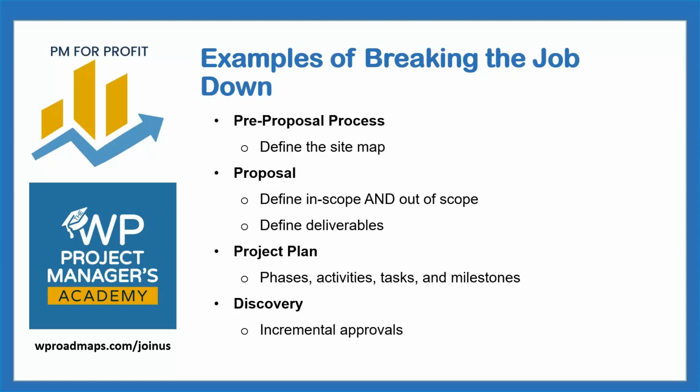It's okay, Mr. Customer, you have approved the sitemap, you've approved the layout, you've approved the content specification, you've approved the functional requirements. So we've now put all that together and included your project plan, and here is your project spec. And they can just review the final pieces of that and say, okay, fine, we're all good to go at that point. And that's your go or no go decision.